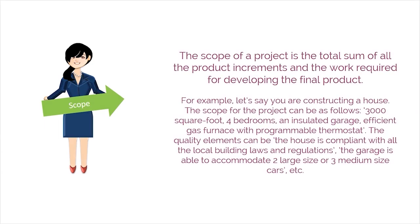The scope of a project is the total sum of all the product increments and the work required to develop the final product. For example, let's say you are constructing a house. The scope for the project can be as follows: 3,000 square foot, four bedrooms, an insulated garage, and an efficient gas furnace with programmable thermostat. The quality elements can be that the house is compliant with all the local building laws and regulations, and the garage is able to accommodate two large size or three medium size cars.